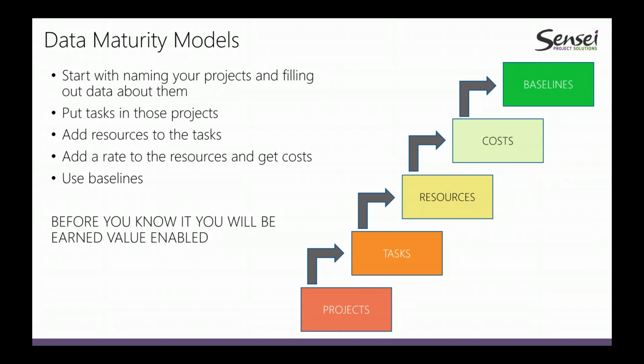The concept of your Project Online being able to provide an enterprise resource then allows you to really step up to the next level and be able to plan whether people are going to be busy this week, next week, 3 months down the line, 6 months down the line, and start to ward off some of those disasters where you're slipping schedules just because you don't have the people. So Project actually provides this concept of enterprise resources.